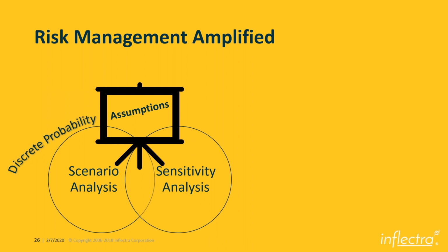Anything over 90% is critical. So you're coming up with some kind of categorization of probability over here. Whereas sensitivity analysis, which we demonstrated before in the efficient frontier, uses continuous probability. There is a difference between 74% and 75%. Right. So when you are doing these kinds of things, you are looking at a few additional things.